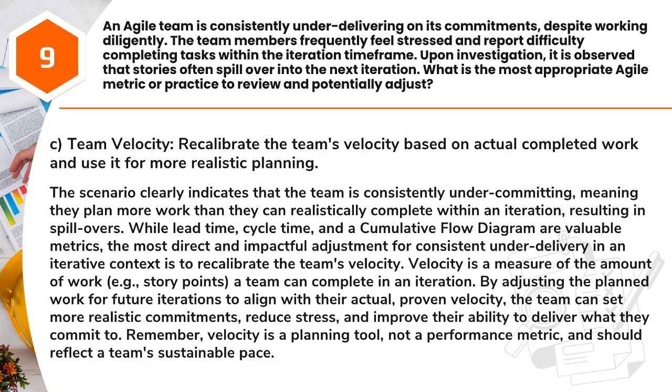Velocity is a measure of the amount of work, e.g., story points, a team can complete in an iteration. By adjusting the planned work for future iterations to align with their actual, proven velocity, the team can set more realistic commitments, reduce stress, and improve their ability to deliver what they commit to. Remember, velocity is a planning tool, not a performance metric, and should reflect a team's sustainable pace.